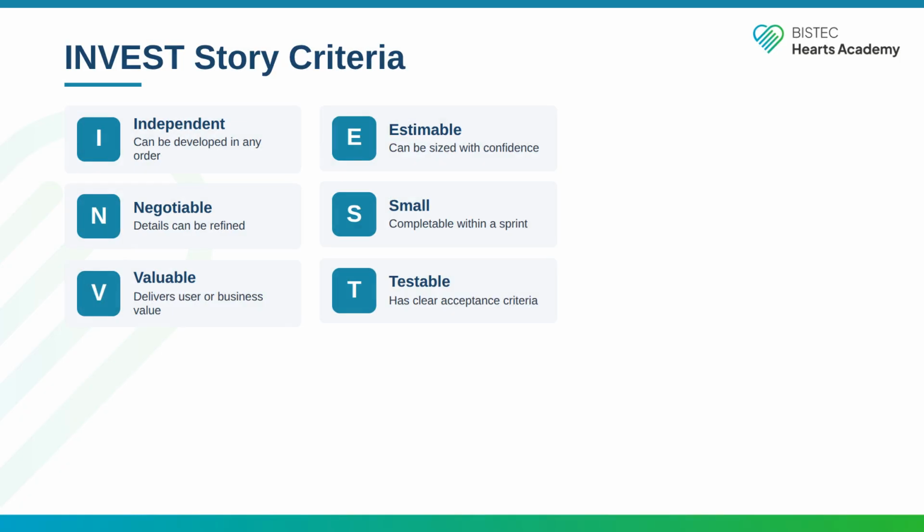INVEST is the standard for well-written user stories. Every story you create should pass all 6 criteria. Independent means the story can be developed without depending on other stories being done first. This lets your team work in parallel and avoids bottlenecks.